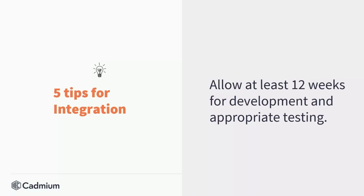And our next slide is another thing we've already mentioned. Really, that first year, it's going to take you 12 weeks to develop the integration. So you just want to plan ahead. And then, obviously, going forward after that, it's really quick and easy updates. All right.